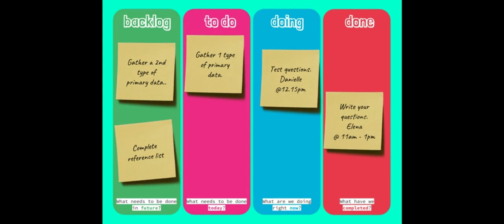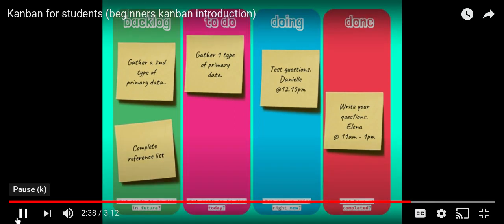So in the end, you'll end up with your 4 columns that has constant flow happening as you move items from the to-do list into the doing, and then fill up from the backlog to add more in the to-do. As more things come up to do on your to-do list, you'll keep adding them to your backlog, so they might be included in the prioritization when you select tasks for the to-do.